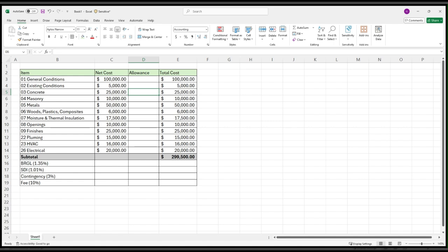Well, that's going to cause a challenge because this estimate is a GMP, a guaranteed maximum price, meaning that whether the conditions change or not, we can't really exceed our contract value. Or in this specific instance where the cement might change, we can't exceed the contract value. So what we're going to do here is put in an allowance for $5,000 to cover us in case we need to spend it. And so let's go a little bit down.